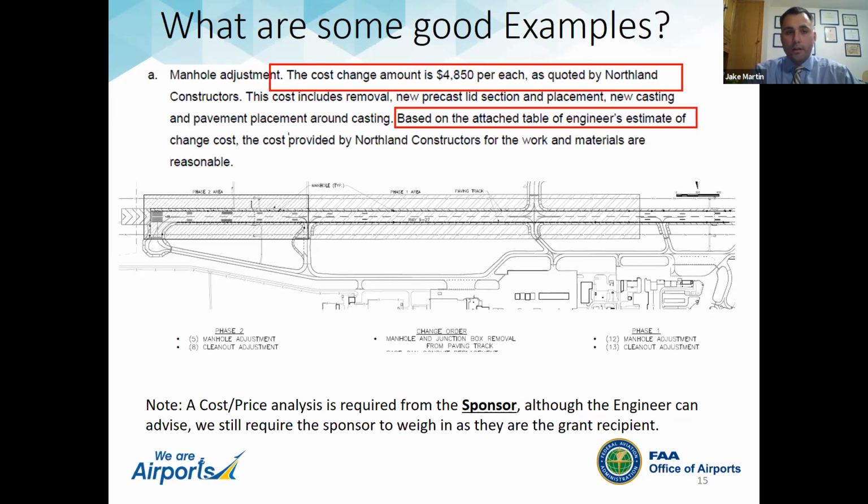And it's okay to make the statement and talk about how you came to that, but remember, it's the sponsor who has the contractual relationship with the FAA through the grant. So the sponsor has to go on record. They can use the engineer's statement and estimates to make that determination, but they go on record to us making that determination on the cost being reasonable.